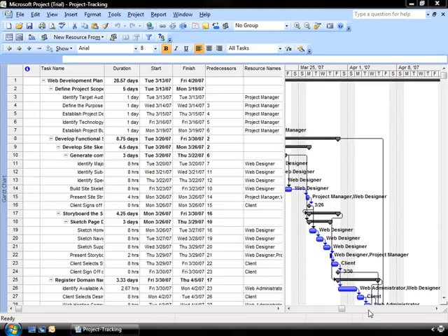Now, it's important to record actual work progress or actual costs incurred because it's going to provide you a benchmark to share with management about how your project is progressing. It will give you the information that you need to share with others to show the progress for that particular project. It also helps to establish a benchmark so that you can continually improve your estimating and your planning for subsequent projects. So it's very important to make sure that you are tracking actuals as you go throughout your project. And that's part of your job as a project manager, to make sure that you get that information in.